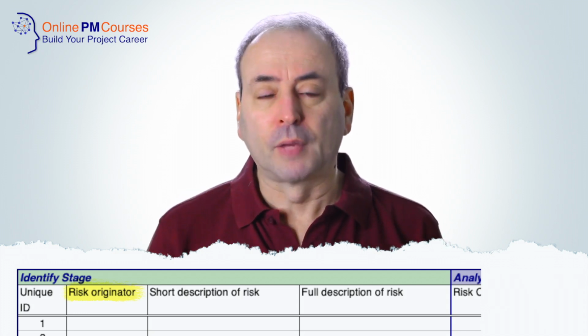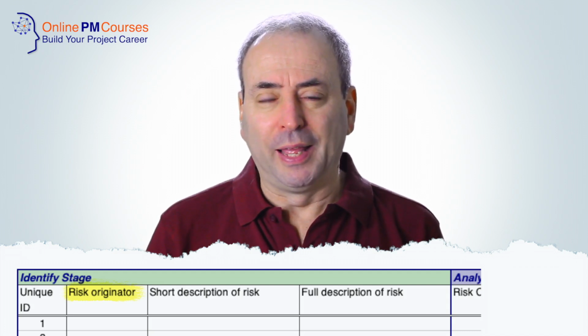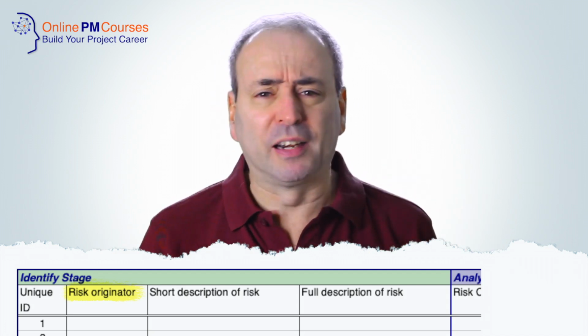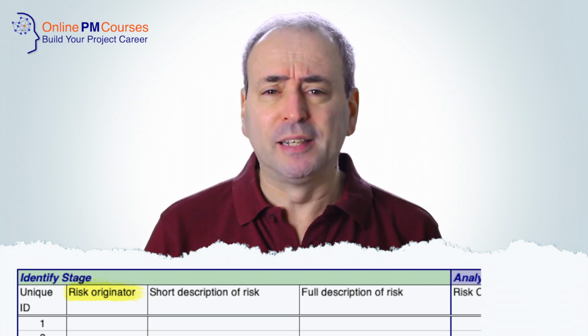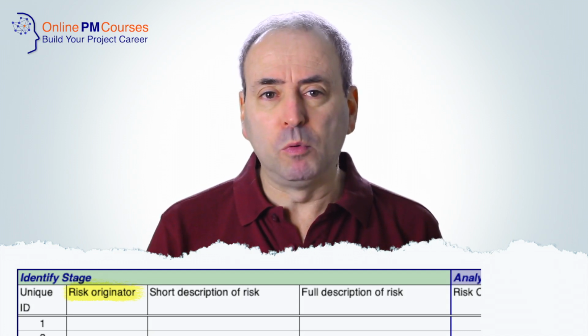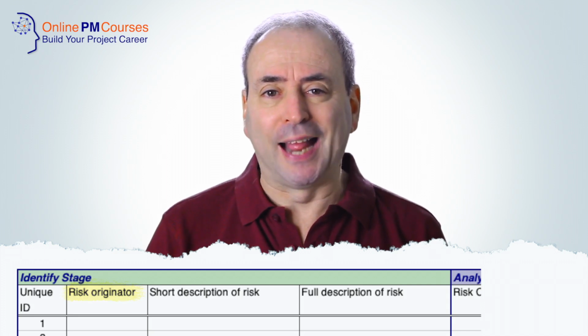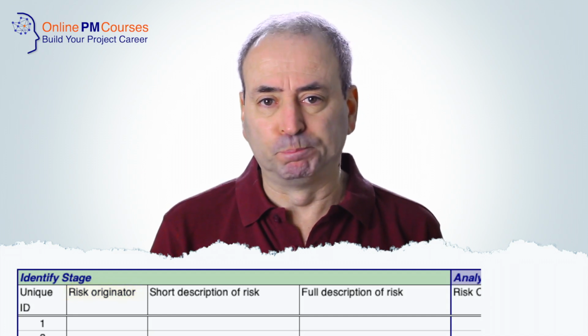Another thing I'd say is once a risk is identified, it needs to go on the risk register. If for any reason you say, no, let's not put that on the risk register, then what happens if that risk really does materialise? Someone will remember that you chose not to put it on the risk register and therefore not to actively manage that risk. And now you become culpable.